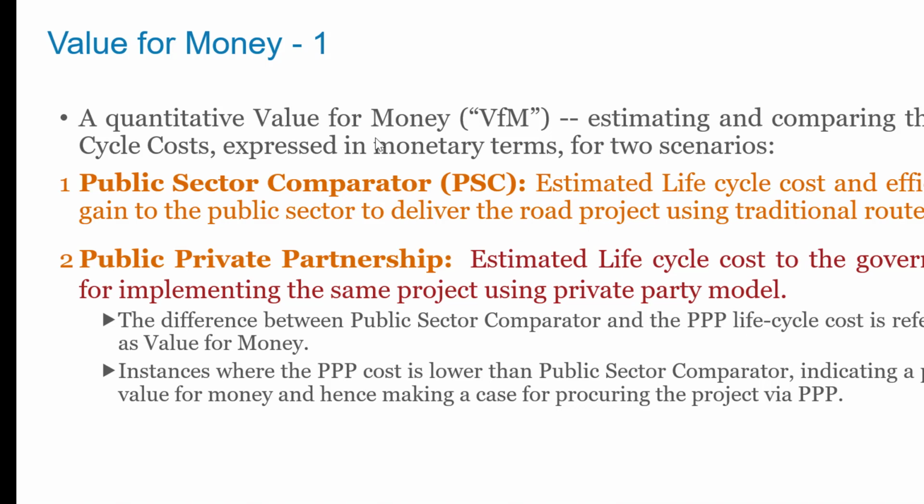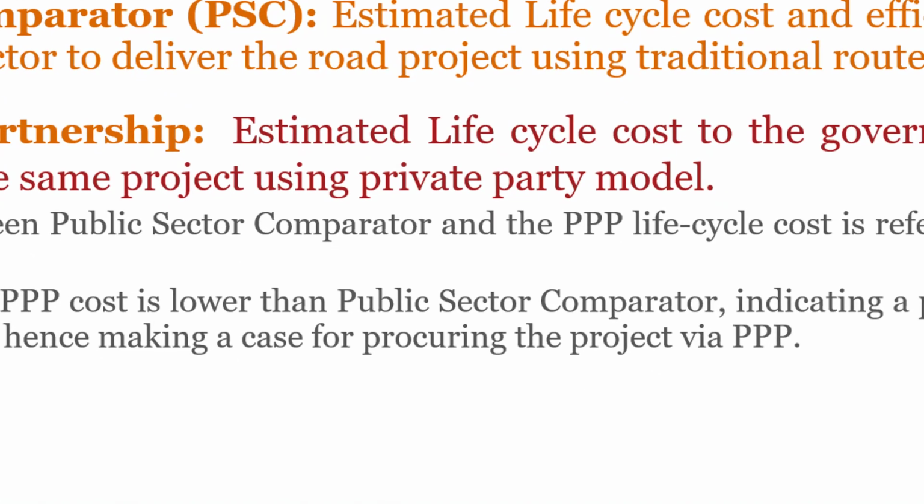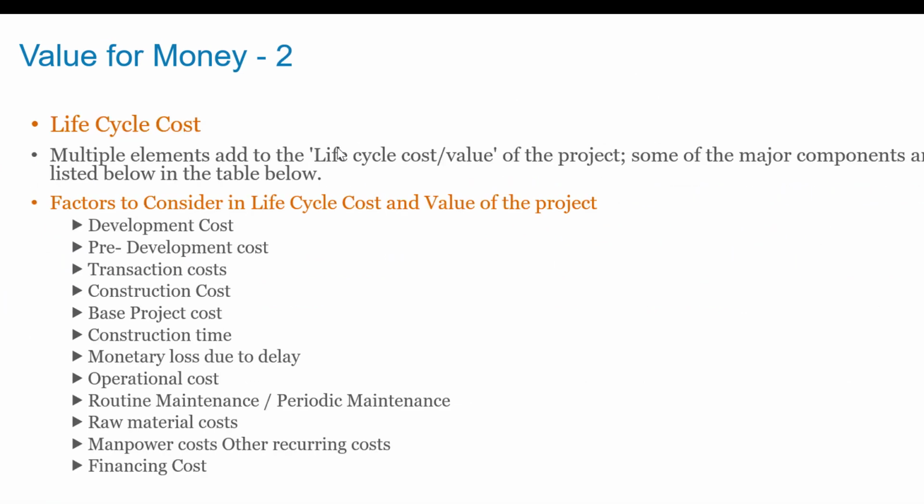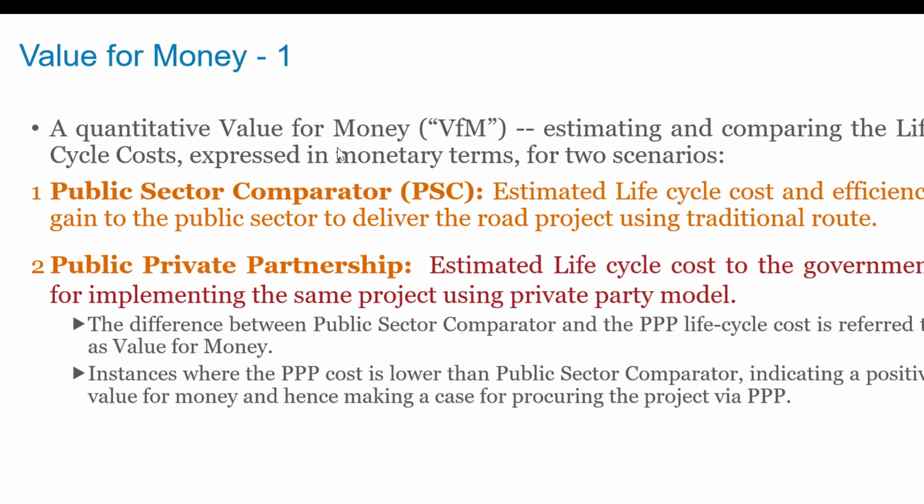You have to say, okay, let's make this PSC. I never knew what that was before. Public Service Comparator. So you might even get a bid on some kind of projects. And then you have the PPP project, and you try to take the difference. And you have to consider the whole lifetime of the investment, of course. You don't just consider the cost of the project up front, because if it's a PPP, at least we're going to assume that we're going to finance it, and we're going to